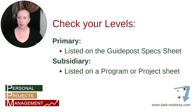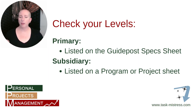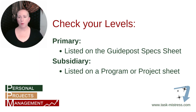Remember, these levels can be nested — going back to the building-a-house example, you've got the house project, then the pouring-the-foundation project as a subsidiary, and that foundation project can have its own subsidiary projects. You can go down that rabbit hole pretty steeply. But at the very least, try to get one or two levels down so that you know exactly what you need to do in a way that's easy to identify.